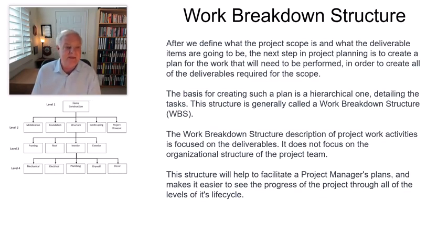So you can see in this particular description that we've got in the graphic underneath me, there's a home construction, and that's level 1. Underneath level 1, there are 5 different areas: mobilization, foundation, structure, landscaping, and the project closeout. That's the second level down. Then, if you take a peek under just the structure element, that third element across in level 2, you now go into level 3, and you can see that under the structure we have the framing, the roof, the interior, and the exterior. All of those are level 3 tasks or subtasks built out from a hierarchical standpoint as we move down.